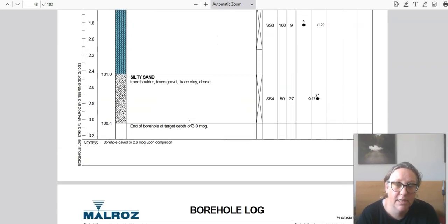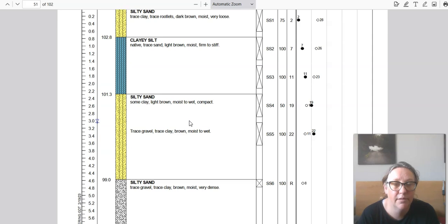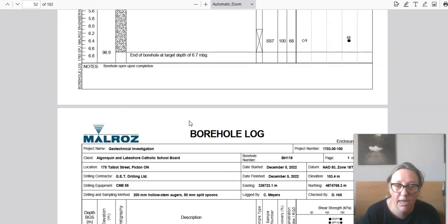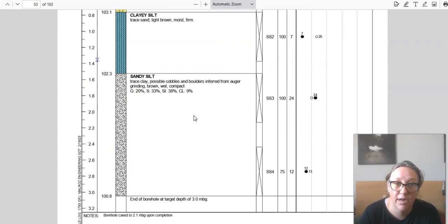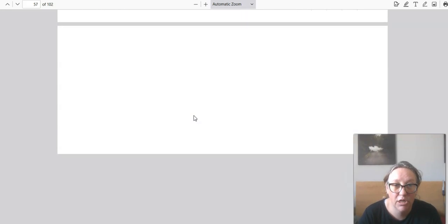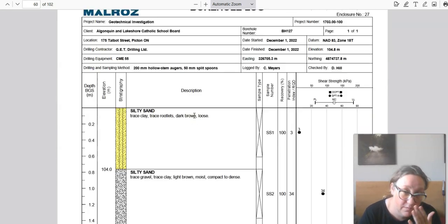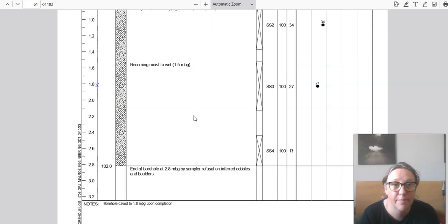And again, these reports are included so that basically your customer can cover their butt. One of the ways that you can get extra money on a fence job is obviously if you have unknown adverse subterranean conditions, which is a long way of saying there's stuff underground that's not good and you didn't know about it. But if they've given you a geotechnical investigation in the bid document, you can't say you didn't know about it because they've given you that information in the bid document. And basically, then you're going to be hooped if you try and get any kind of extra change orders for difficult digging conditions or anything like that.